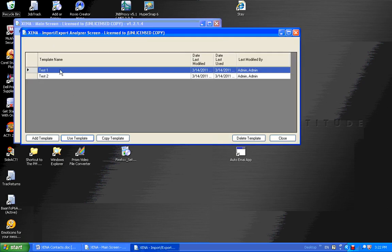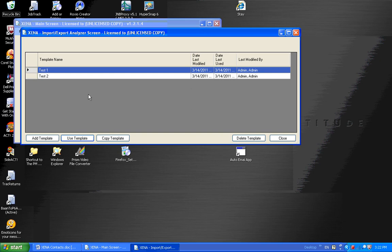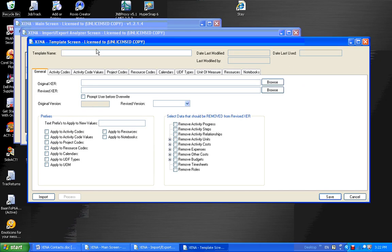Right now we're listing the templates that are currently in my Xena database. I have two templates, and you would have a template for each XER source. For example, if you have two subcontractors sending XER files into you, you would want a template for each one of those XER files, because you want different rules applied to each one. I'm going to add a new template and I'll call it Demo 1.